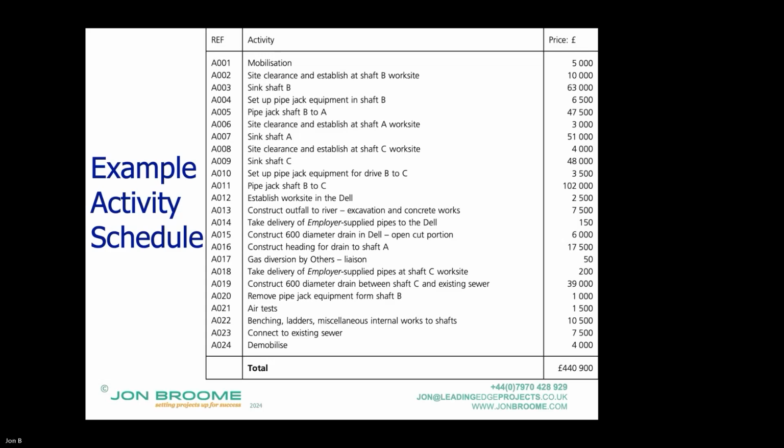Okay, so you have to agree on an assessment date. Yes, assessment dates, early on. Normally in the contract data, assessment dates are stated as being the last Friday of each month or something like that. Okay, and that's for NEC. Yeah. We will later on talk about milestones and lump sums. Okay. Thank you.